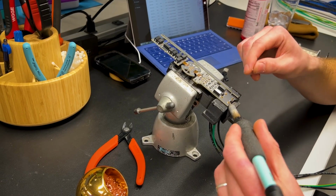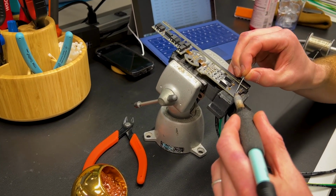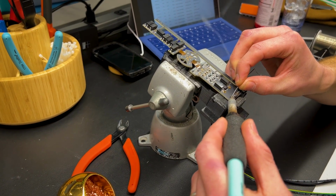Talk to us a little bit about lead time on something like this. You touched on the manufacturing and the production piece. What does that mean for lead time if somebody ordered 50 pieces of these today? Typically we build ahead, so we have a safety stock that people can order, and it'll be available for them. The process takes roughly 5 to 7 days to build, with the soldering and our other internal processes, the potting, those types of things.